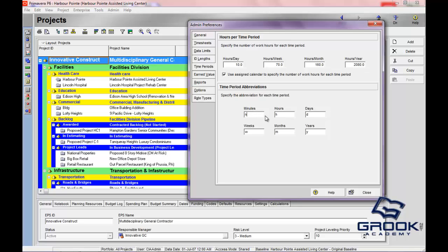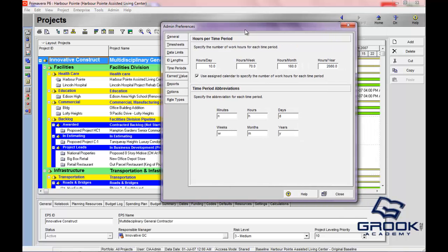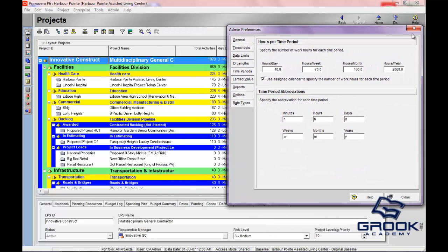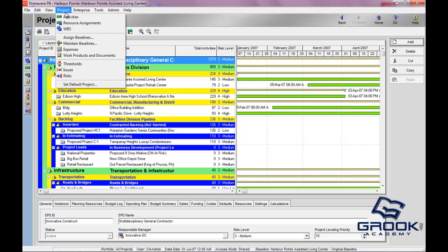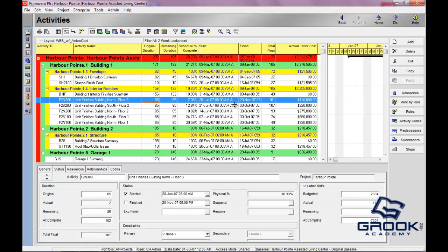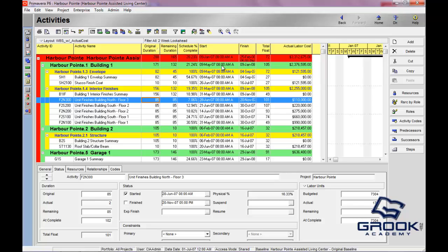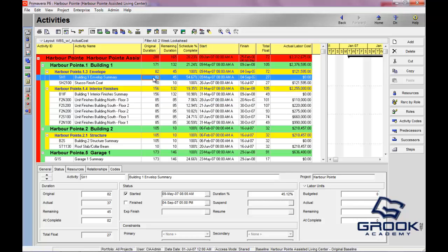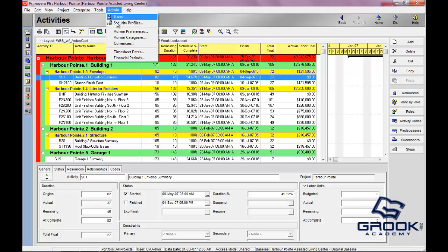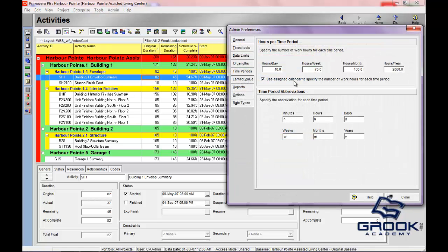Here you'll see abbreviations for time periods. When you put a duration in to a project, you'll very often see, especially depending on what kind of time scale you're using. If you're using minutes, if you're scheduling something down to the minute, or to the hour, to the day, I think most projects you'll utilize a duration of one day. This particular project has days. This is an 82-day project. But it is possible to use minutes, hours, all of that stuff. From the admin preferences, you'd want to set the abbreviation that would go behind this number. You'll see that minutes is N because months is more common, a more common duration than minutes. So they choose the N. Everything else is pretty straightforward. Hours, days, weeks, months, years.